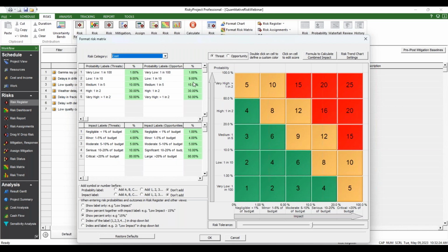So I always, when we do that, if you're going to be using this, we will go through and set up, and this may not be exactly how you want to do it, but you can set up these ranges. They have to equal 100%. So we can better reflect the impacts of the risk on the risk matrix. Okay. It's one of the issues. The risk matrix